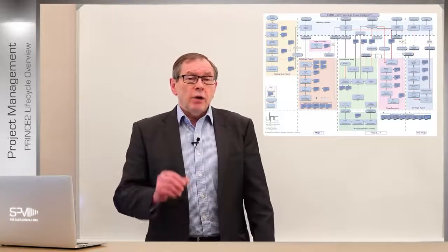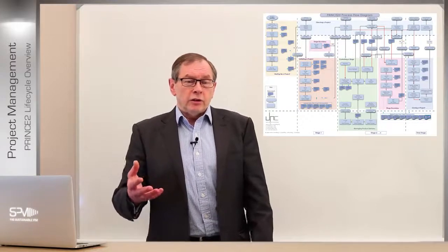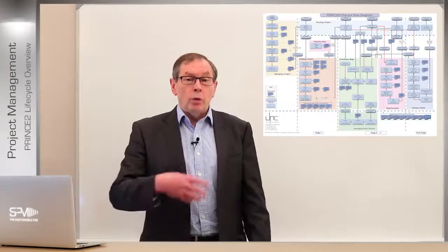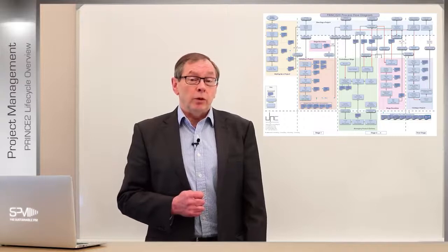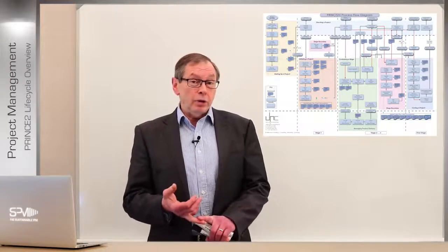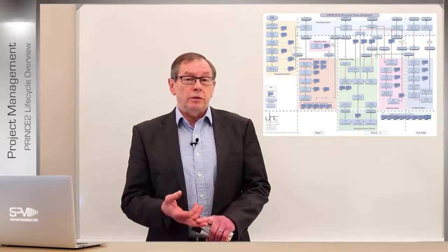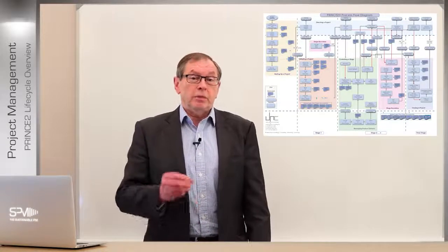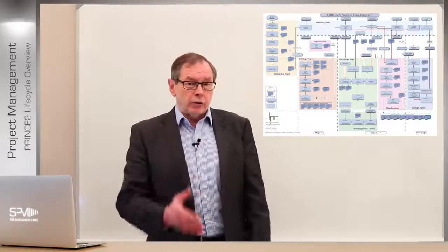It's about allowing the people who own the project, in this case the project executive or at corporate level, to make decisions about going forward from here onwards. The three key words in PRINCE2 are desirable, viable and achievable. Do we still want it? Desirable. Viable: can we still build it? And of course, finally, achievable: will it still deliver what we expect it to do? And what we expect it to do is deliver beneficial change. It's about the benefit. So that's what we're going to look at, how we govern that through.